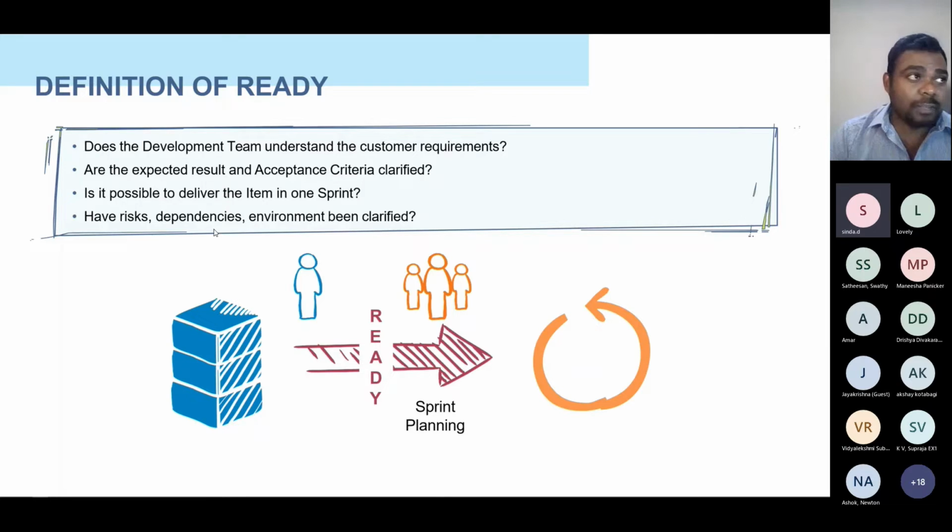So we need to have a thought, because the recommendation is that once your user story is done, it should be functionally working, meet all the acceptance criteria, and be ready for delivery. So if you have a dependency with another team, you can't deliver it because you haven't done the testing. It's still pending. You can't make sure that it works.